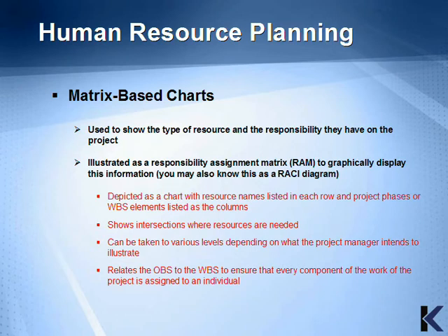It shows the intersection where resources are needed and can be taken to various levels depending on what the project manager intends to illustrate. It relates the organization breakdown structure to the work breakdown structure to ensure that every component of the work of the project is assigned to an individual.